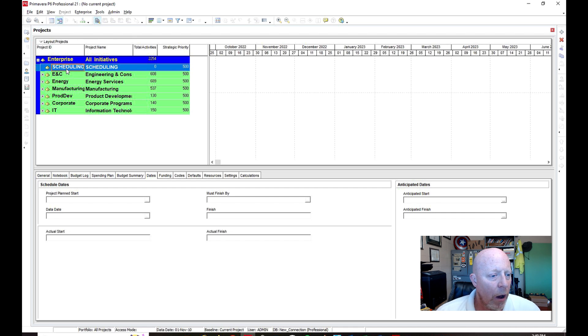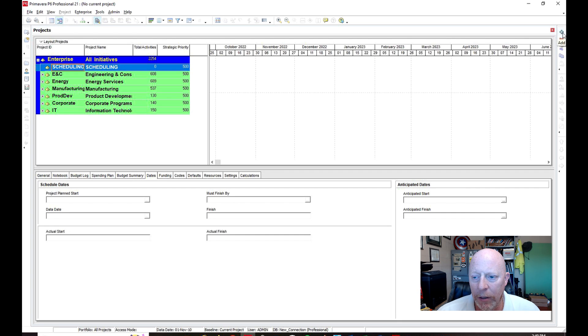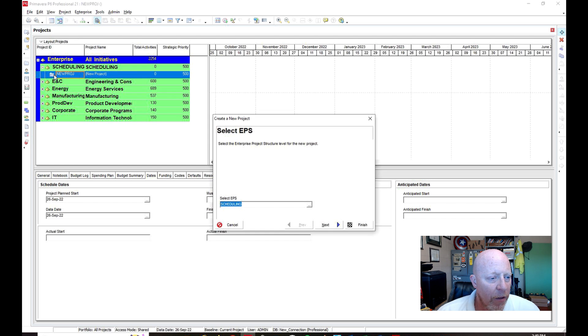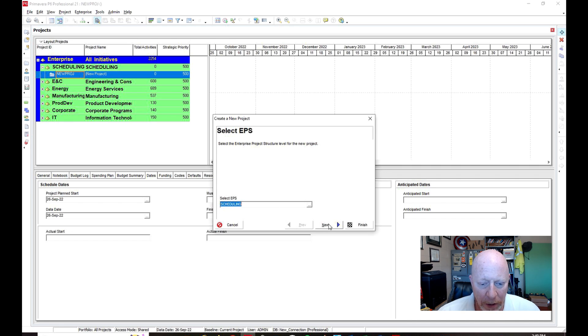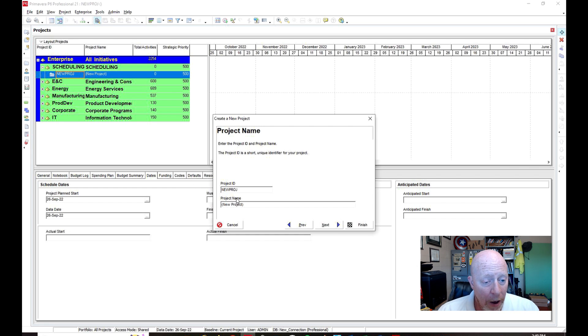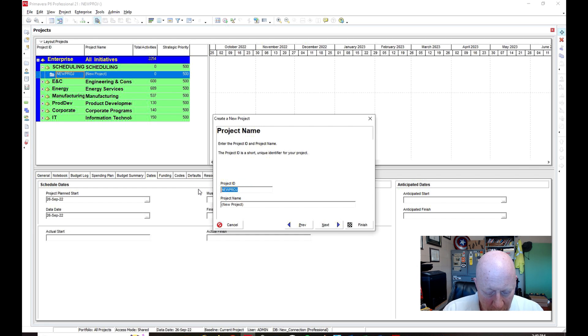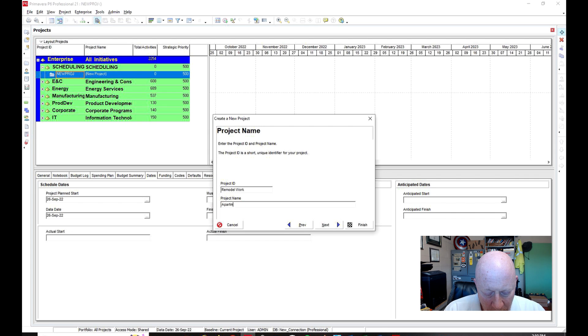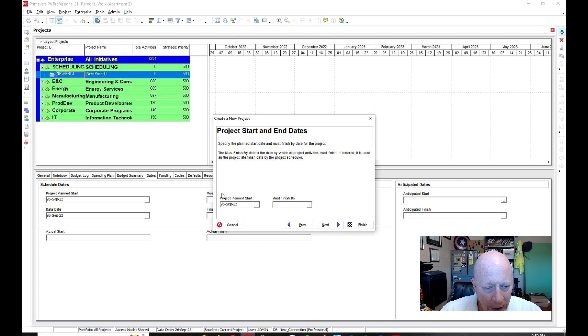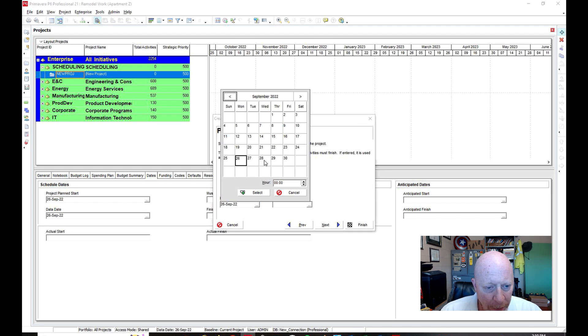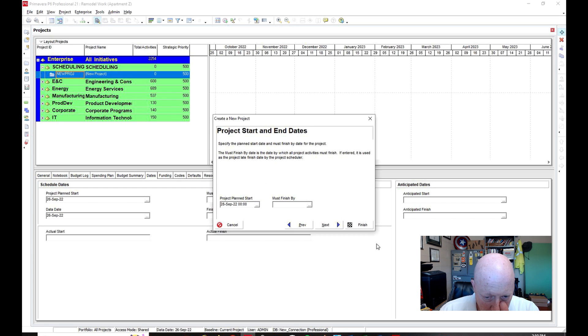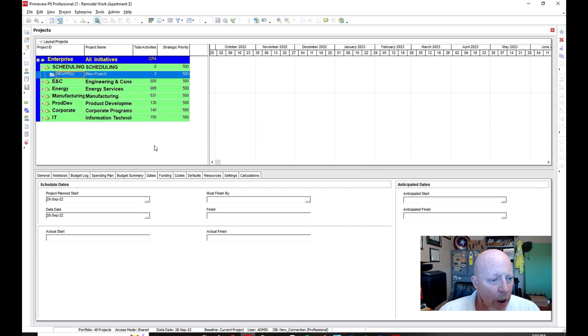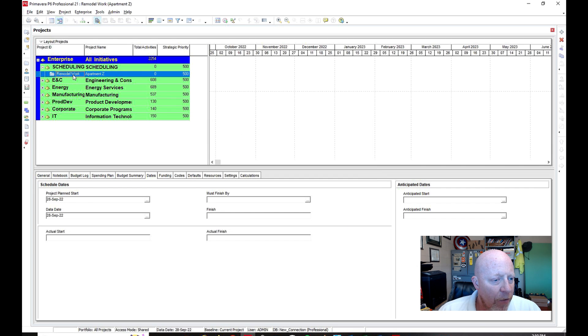So underneath Scheduling, I'm going to go all over here to the far right and click on the plus. And what that's going to do is drop down underneath there a folder. So this folder is, I'm going to just keep it at Scheduling just to keep things simple, or the EPS is at Scheduling. Underneath the project ID, I'm going to put, let's say, Remodel. Remodel work, how about that? Project name, I could put Apartment Z. Then just for a start, I'm going to put on here Wednesday. It doesn't really matter. You put on there whatever you think your project would start.